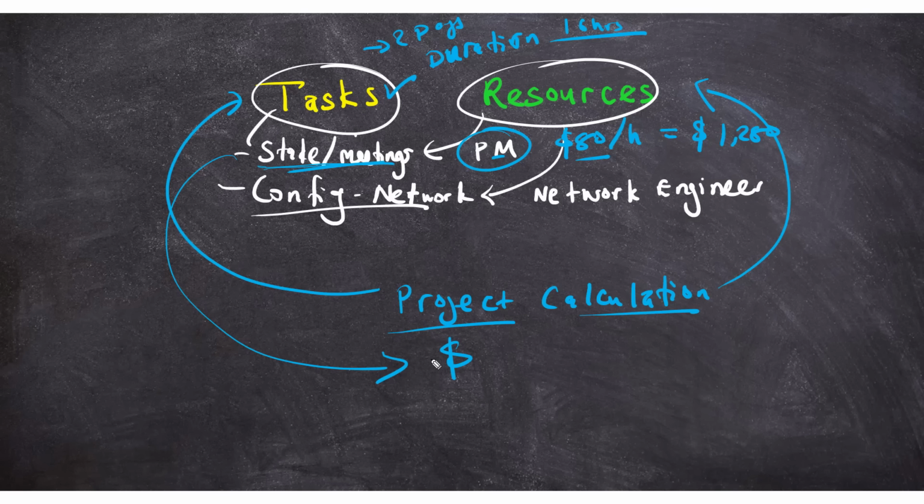There's actually more to this. In fact, when you look at how you'd manage real projects in the industry, sometimes there is a lag. Let's say this stakeholders meeting, instead of it running for 2 days, ended up being 3 days, and now you have to figure out what the total cost is for 3 days, etc. You would also make use of what is known as a baseline. The baseline would give you insight into what exactly is happening in terms of what you had projected your costs to be and what your actual costs are, etc.